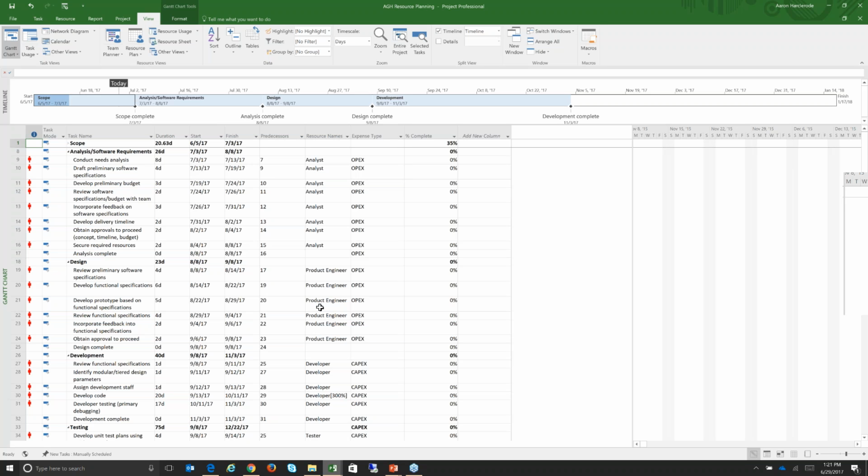Recently introduced in Microsoft Project and Project Online, a little bit over a year ago, is a new feature particularly useful for PMs and resource managers called the resource engagement process. What this allows you to do is really incorporate the resource managers into the workflow, so that when a PM needs a particular resource or type of resource, there's a process built around that. Let me show you quickly how that works.